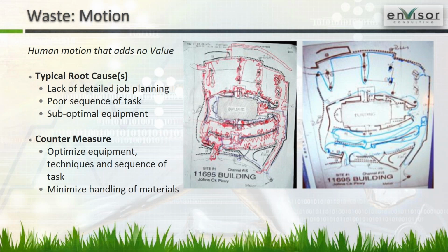It made all kinds of sense to change the schedule around and try to service this particular building as early in the morning as we possibly could, before the parking lot filled up. And on top of that, it's a fairly flat parking lot. So instead of doing it with a backpack blower, let's just do it with a street blower, like a little wonder of a Billy Goat that the guy can push around. And that's the blue line that you see right next to it. You're accomplishing the exact same thing. It's just blowing a parking lot. It shouldn't be complicated.